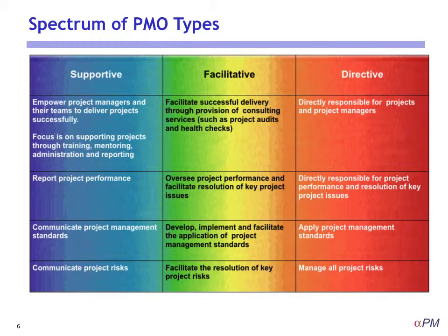There is also a wide spectrum of PMO types. I've kind of summed it up into these 3 main areas, but there are lots of variations in between. But let's start with the supportive type of PMO. These are the PMOs that are mostly passive, if I can use that word. They sit on the sidelines and they do provide training, they do provide methodologies and tools and templates, but then they mostly just collect status reports, and if there's any problems, they forward that on to senior management, who then deal directly with the projects to help them out.